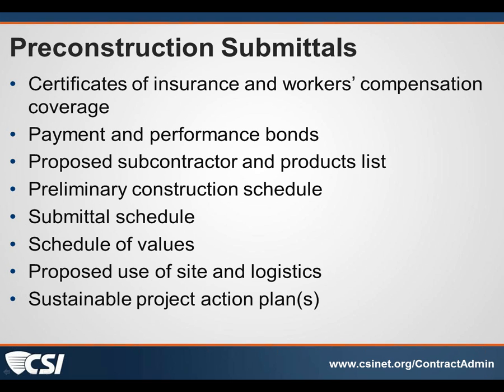I would advise when you get those to look at them again, and Jim mentioned this, check the expiration date and put a reminder on your calendar to ask for a renewed insurance certificate if you have a project that's going to last past that expiration date. That's something that we would all be well advised to do, and it's not something that I necessarily remember doing every project, but I try to. So Mohammed, if that does not respond to your question, please feel free to clarify and send us another one.